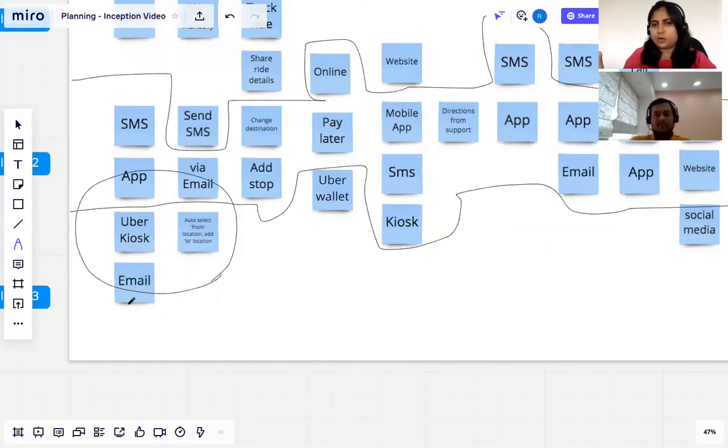So we prioritized it and said, let's go just by filter by date for now. Okay, so we did that. The next release was, say, filter by name. And then later, filter by attachment, filter by subject line.